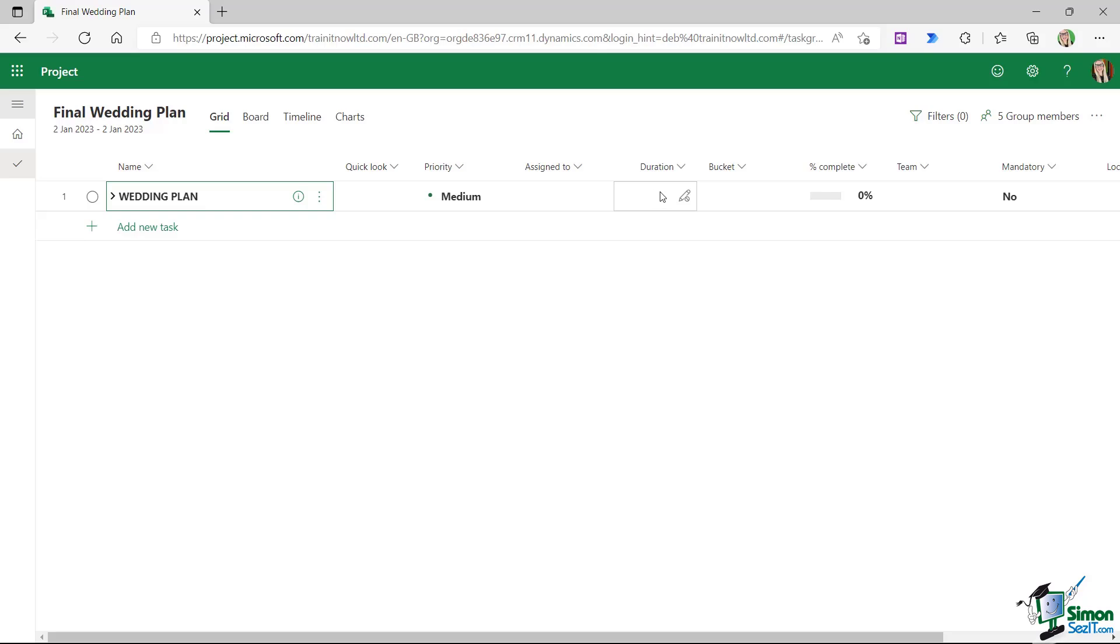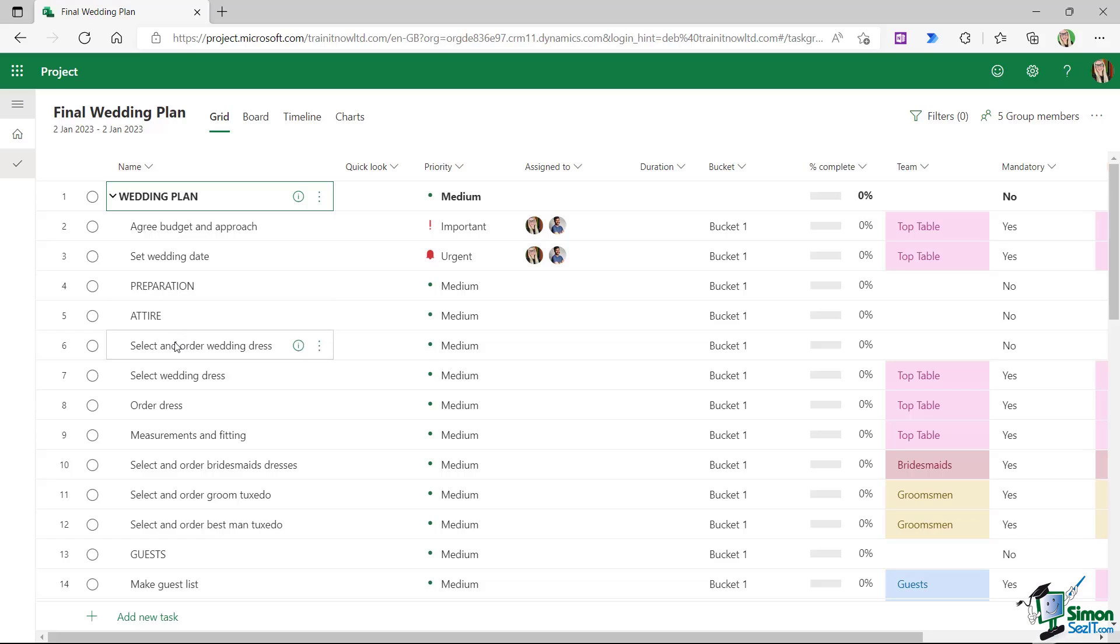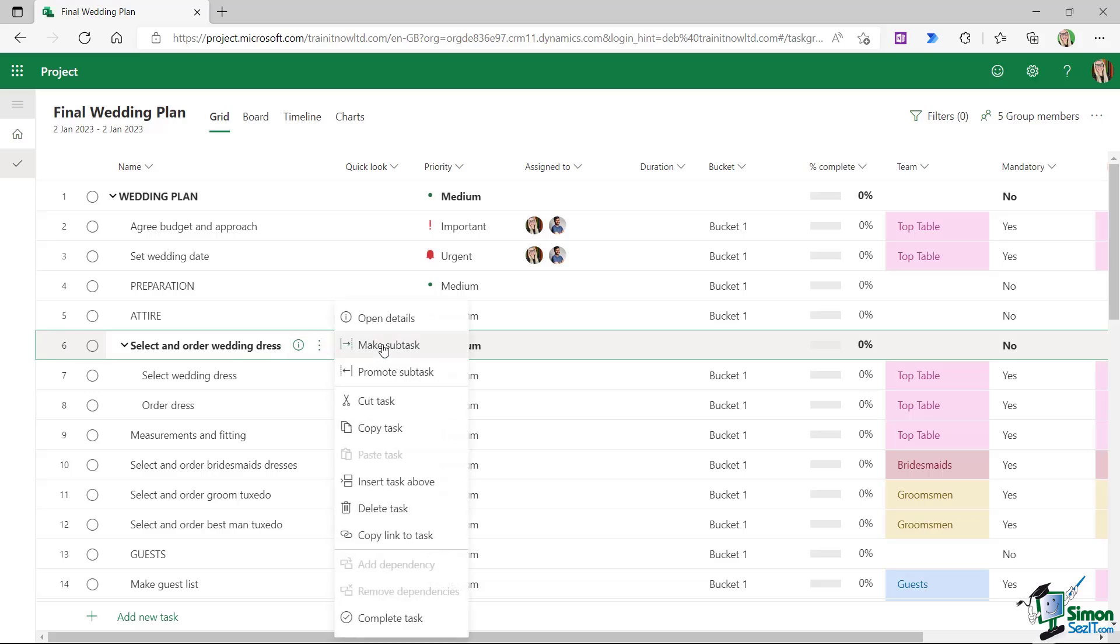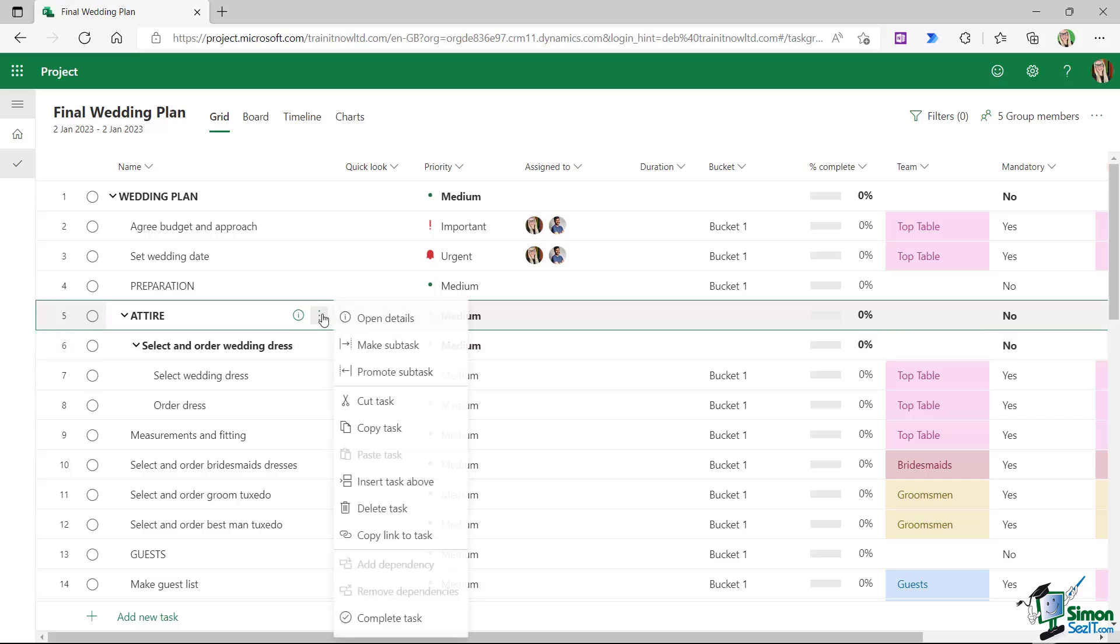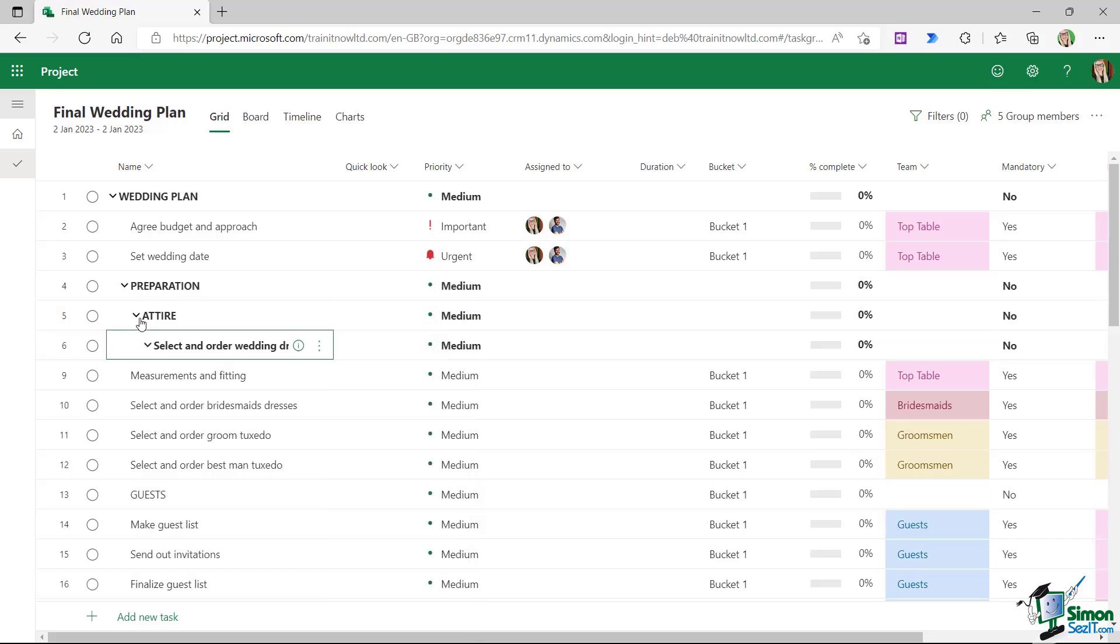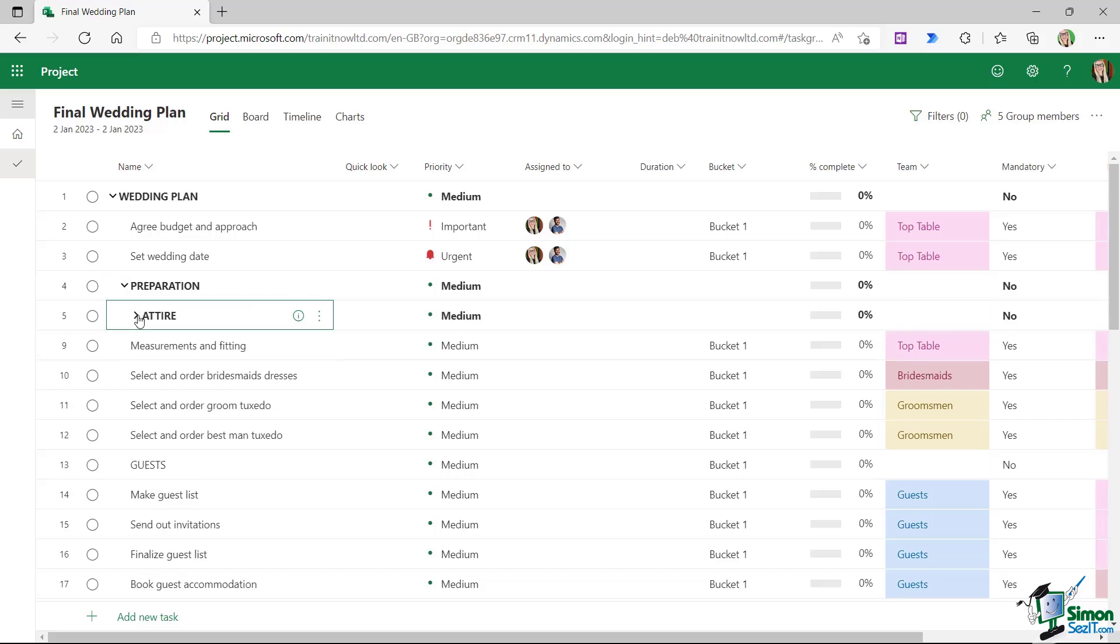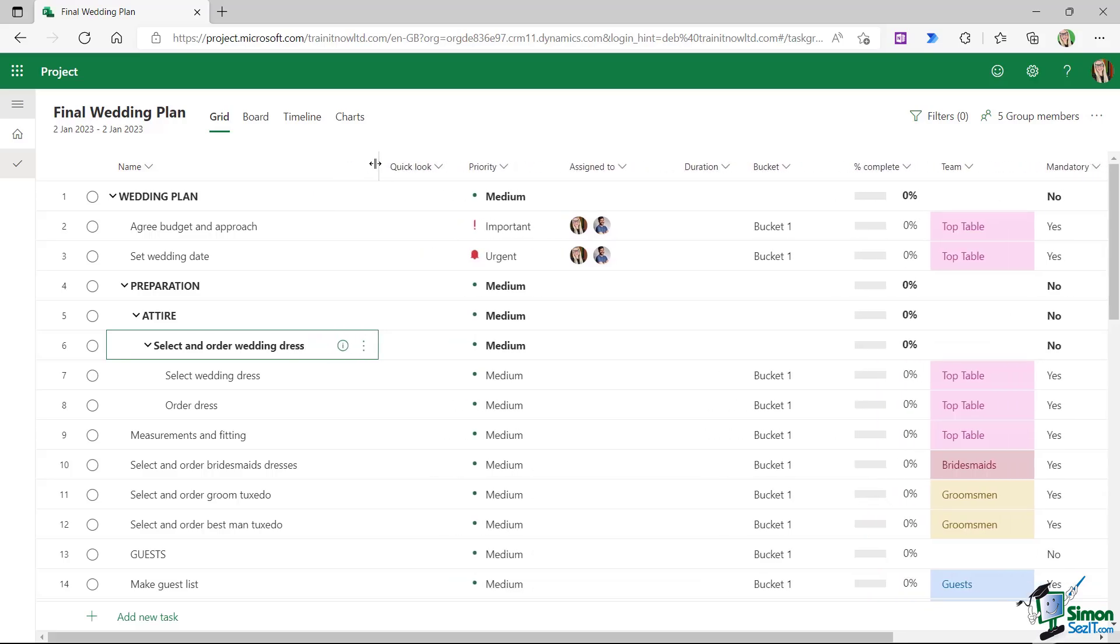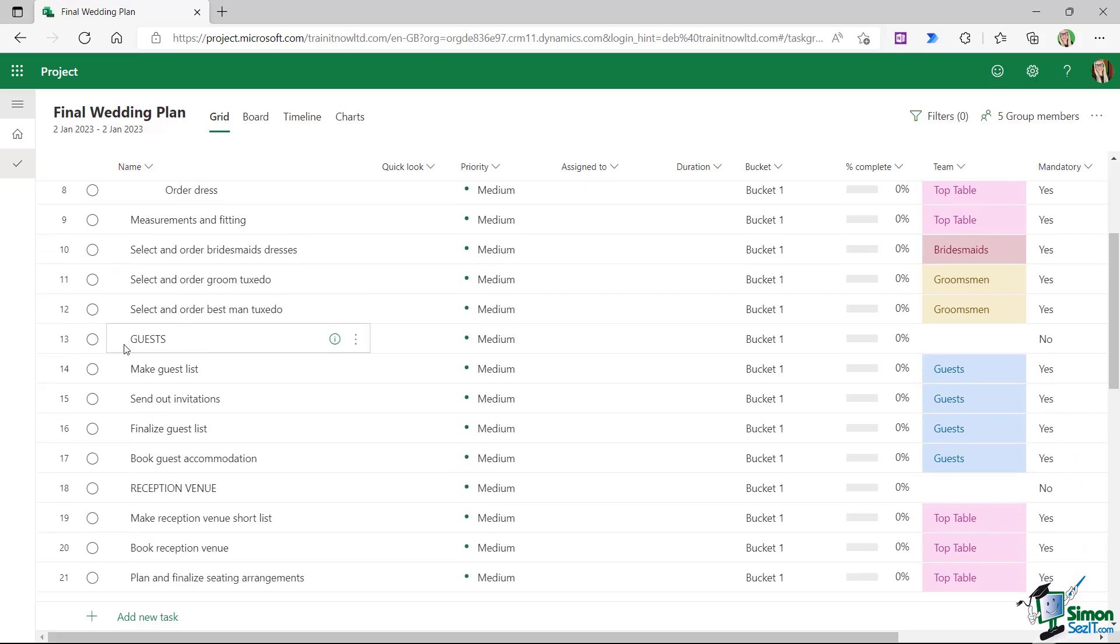Now let's go through and create more summary and subtasks. Now here I have preparation, attire, and select and order wedding dress. And in my spreadsheet I have these as effectively summary tasks of each other. So I'm going to select task number seven, hold down control and select task number eight, and I'm going to make those a subtask of select and order wedding dress. I'm then going to select task number six and I'm going to make that a subtask of attire. And you guessed it, I'm going to select task number five and I'm going to make that a subtask of preparation. So now I can collapse up these different sections and really hone in on exactly what I'm interested in. So we're adding structure into our project. Now don't forget that we can also change the size of these columns simply by dragging this out and in. So if you're struggling to see your task names, you might want to resize those.